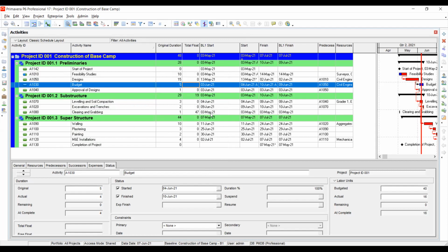So in case there was no big change between the start and the baseline start, all the dates will be the same. And it's giving automatically the same with the start and finish, right? Okay, if you adjust now like this, we changed it to 4th. You can see that its baseline start is still recalling the day that you've scheduled, which is 3rd June. But now you've put the one that you updated, which is 4th June.